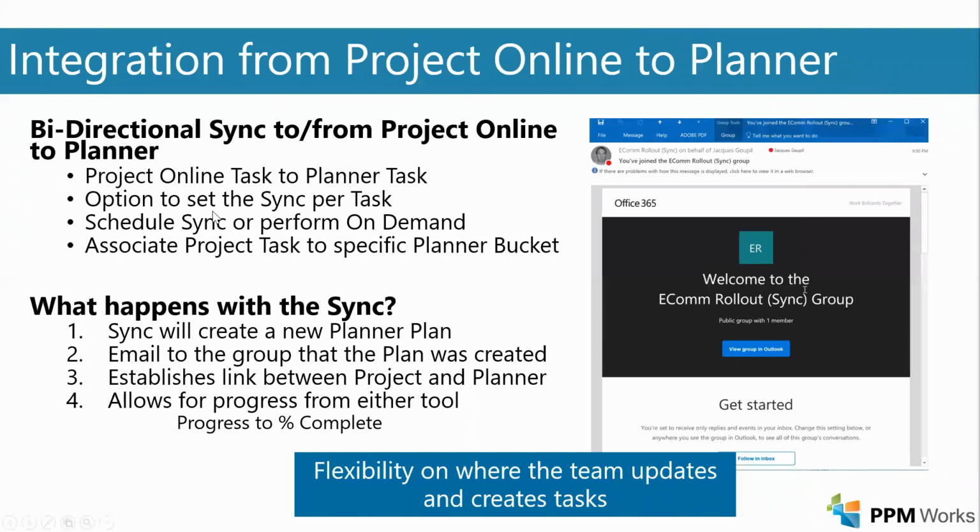So this is going to offer a bi-directional sync to and from Project Online. Okay, so it's going to be a Project Online task to a Planner task. So that's different than what we had before. It was previously a Project Online task to an entire plan. Okay, so there wouldn't be that one-to-one connection that there is with this bi-directional sync with this tool that we leverage.